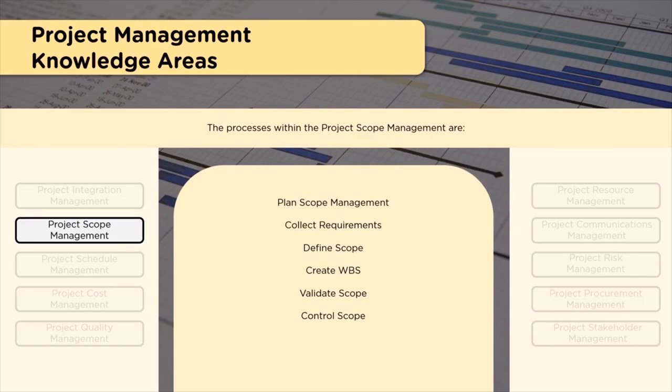Now, a very important thing here is the work breakdown structure. So we have a product or a service or a result which we are working on to create as a result of the project. How will you understand all the parts of it? That needs breaking down that particular product or service or result which we are going to create into multiple pieces in a structure which would look like a tree, so that you will get the necessary insight into what is being delivered. So firstly, a product breakdown structure is made, and for each of the layers of this product breakdown structure,